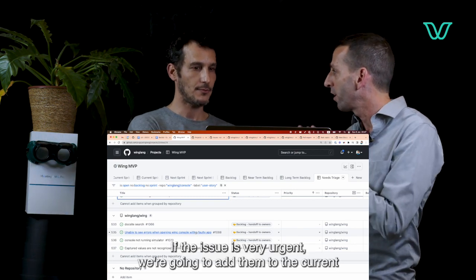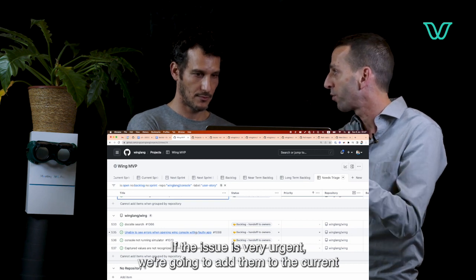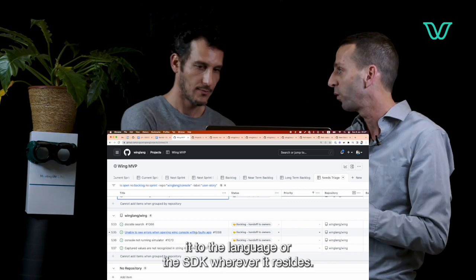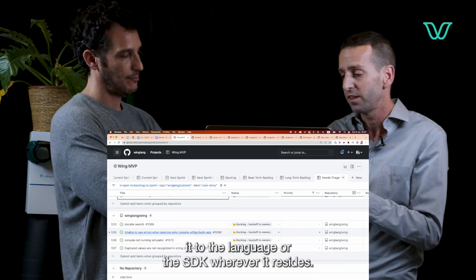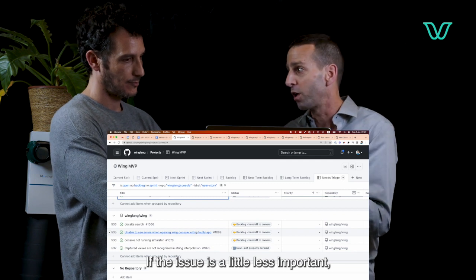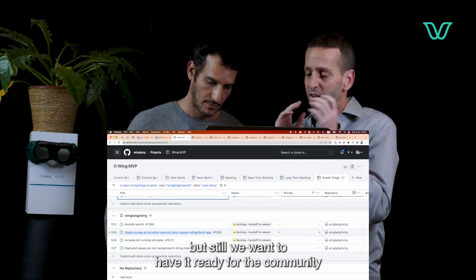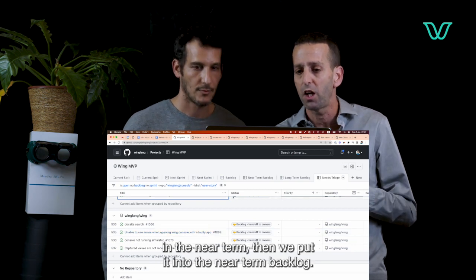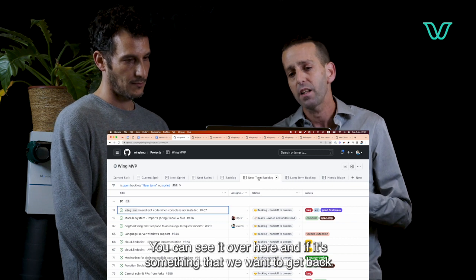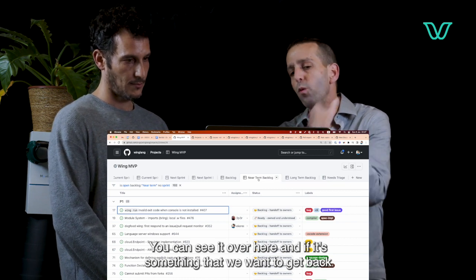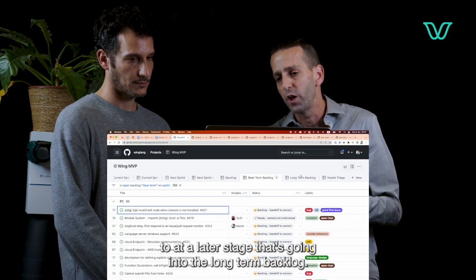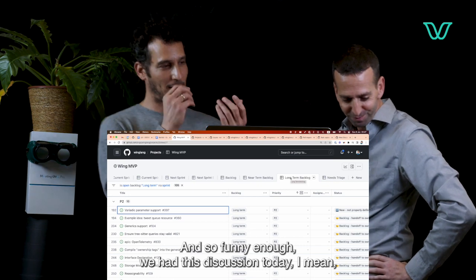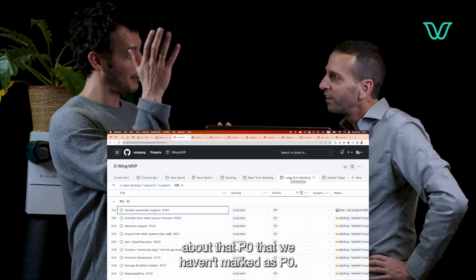If the issue is very urgent, we add it to the current sprint and someone picks it up right away and starts working on it, in the language or the SDK, wherever it resides. If the issue is a little less important, but we still want it ready for the community in the near term, we put it into the near-term backlog. You can see it over here. And if it's something we want to get back to at a later stage, it goes into the long-term backlog.